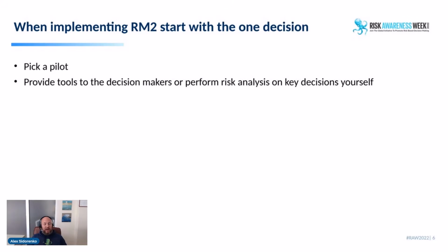Whenever you are participating in a government-private partnership, and you want to build some sort of infrastructure project together with the government funding, the Ministry of Finance has a methodology that requires you to model schedule and cost risks, and you have to give them P95, P5, like they request normal risk metrics. So I was very delighted to see that it exists.